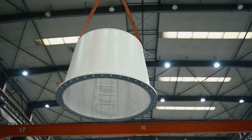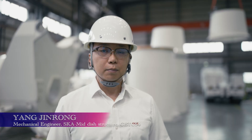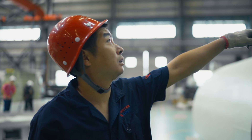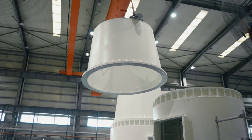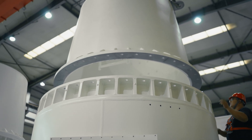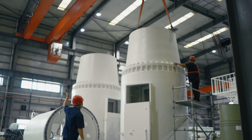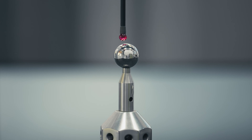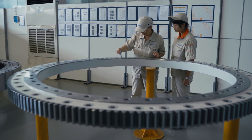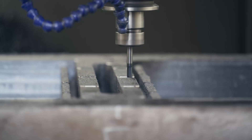The first dish being integrated here at CETC54 can produce more time for SKA construction. The shipment of the second antenna takes about two months, but using this antenna we can bring the verification tests ahead. Eventually, it will be assembled again in South Africa with the other three antennas. The challenge is keeping the posture and position of major components precisely, and we have been working with SKO to establish a solid integration and verification process to help manage this risk.